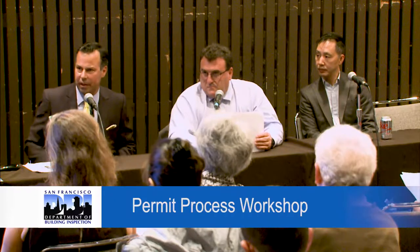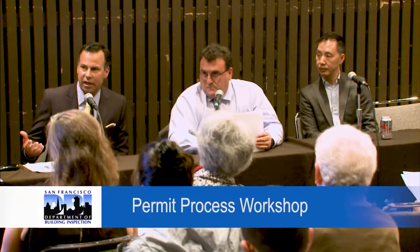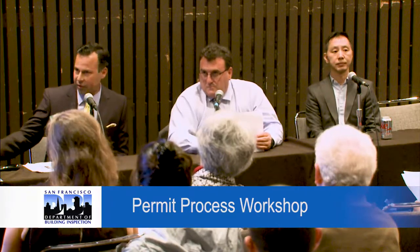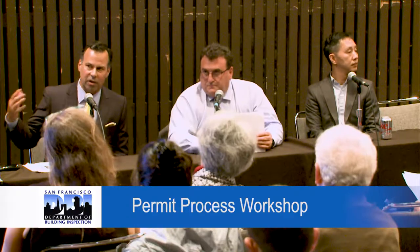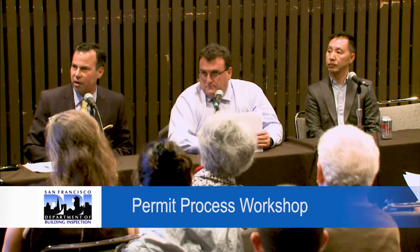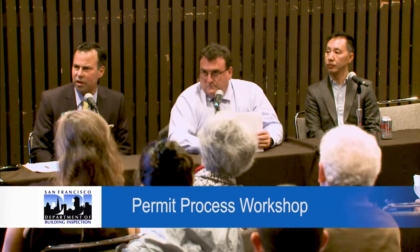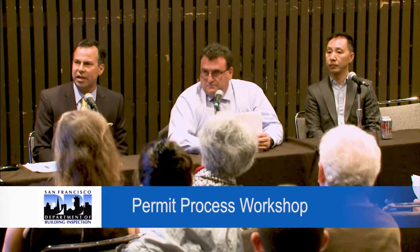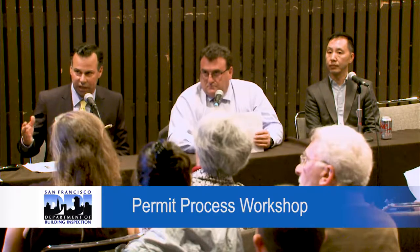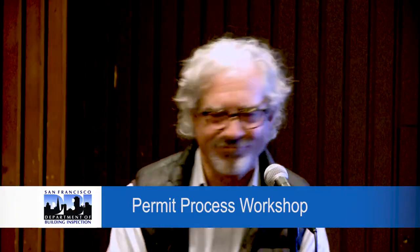Now, that's when the permit expires. We offer one-time extensions, so getting near the end of that expiration period, you would come in for an extension for another 360 days. Beyond that, you would need a senior building inspector to talk about your project and see where you are. If it's over $1 million, I believe you have 720 days. Yes, and it's the same thing with the extensions. You would have to get permission for the second extension. Very good, thank you very much. You're welcome.